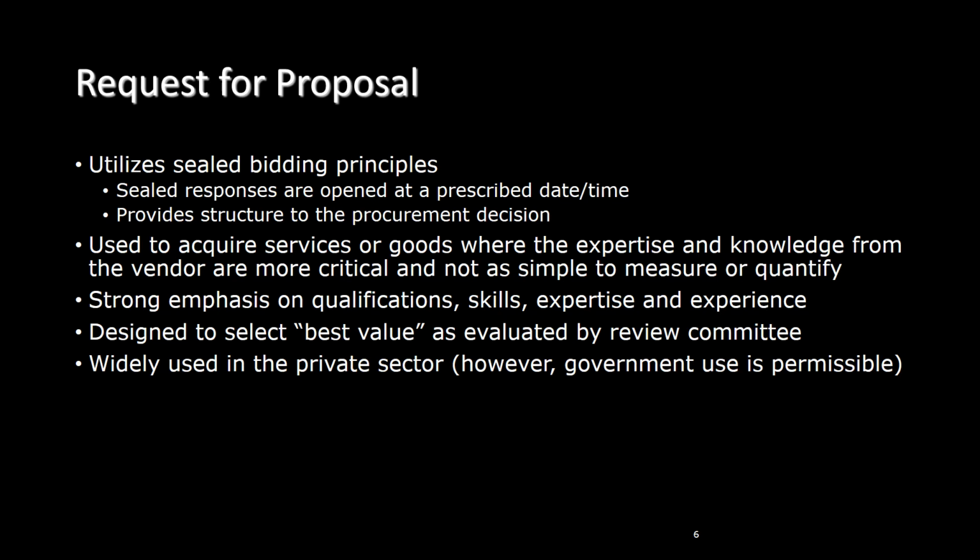Product information such as stock availability and estimated completion period, as well as customer references that can be checked to determine a company's suitability. The evaluation criteria for an RFP is designed to select the best value as evaluated by a source selection or review committee. RFPs are widely used in the private sector, however, government use is permissible.